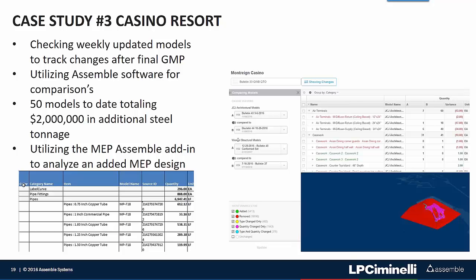we composed a template within Excel that had a cover page with some brief information: project number, what scope of work was being compared, and also what models were being compared along with their date. And then on the backup pages we showed changes in structural framing, and we would also show changes in structural columns, and any angles or plates or other supplemental steel that was within those areas was also accounted for.